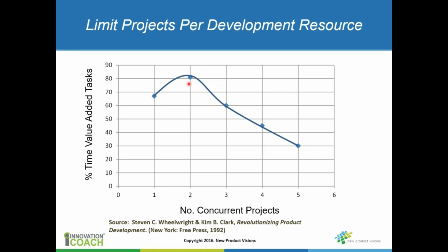It's better really, if they are working on two projects, for one to be in the early phase and one in a more critical later phase. So you have to think about critical paths and where they are in the phases.